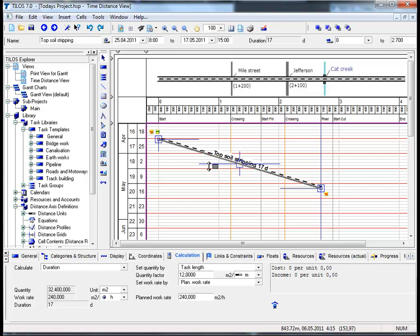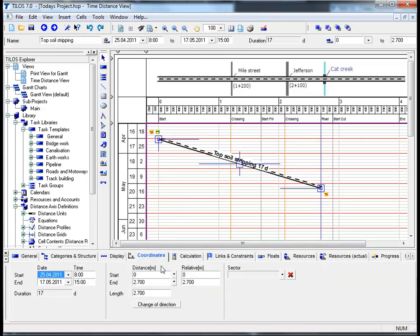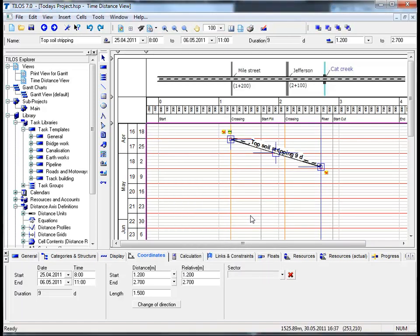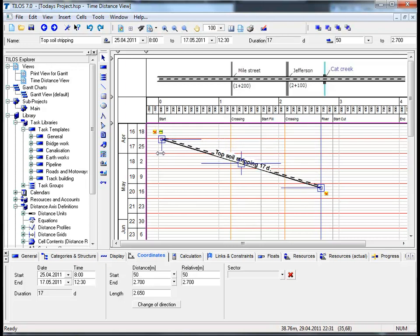Changing your task coordinates in TILUS is relatively simple. Click on the coordinates view tab in your details toolbar and click on the start or end distance in meters - you can choose any distance or start station grid point from the combo selector. We shall choose the crossing at 1,200 meters; you can see that not only the duration of the task has changed, but also the distance and end coordinates have been amended accordingly. Using your mouse, drag the edit lines back to 0 - the task end snaps to the 0 point, making precise positioning of tasks much easier in drawing mode.